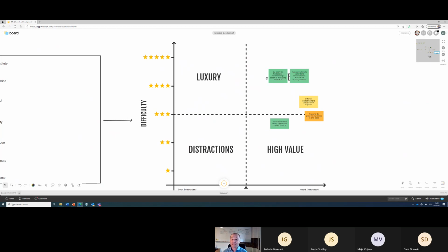So up in the right hand corner, you've got some high impact solutions, but also not so easy. So maybe putting a coach in place is not so easy. Finding the time is not so easy, but that will give you some good benefits. Down here, though, you've got some easier things that can be done, like tracking the projects process in a simple way in one place. That can give you huge benefits. So that might be your priority number 1 activity.